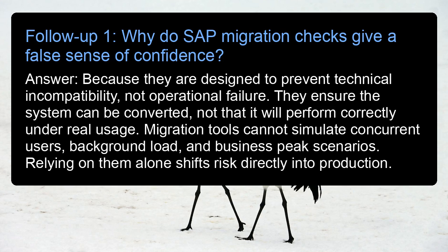They ensure the system can be converted, not that it will perform correctly under real usage. Migration tools cannot simulate concurrent users, background load, and business peak scenarios. Relying on them alone shifts risk directly into production.